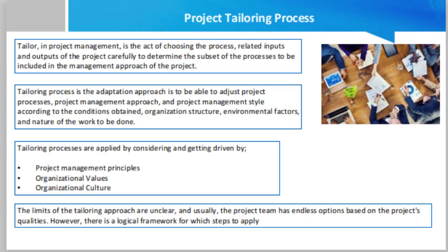To illustrate the need for tailoring, let's take an activity in the build phase of the development process: do code review. Code review adds a great deal of value in many cases, but sometimes its added value is not commensurate with the effort required. Also, the review could be done by either a group or by one person. The standard development process does not specify how code review should be performed.